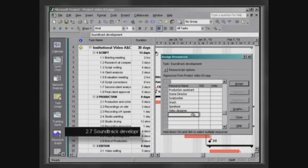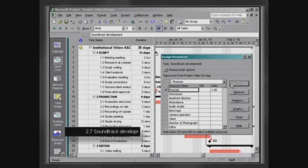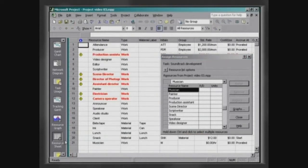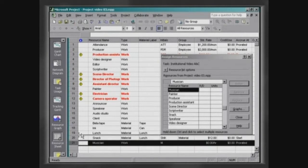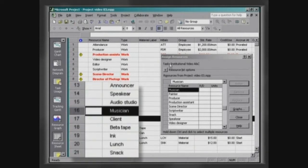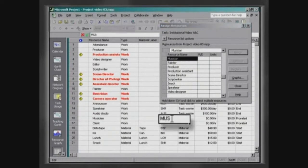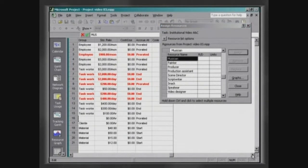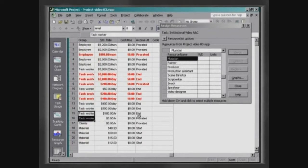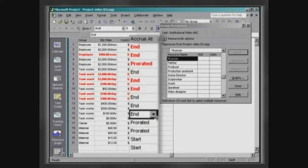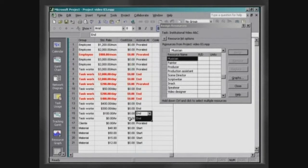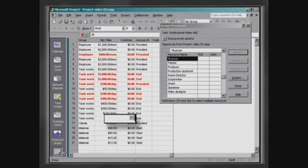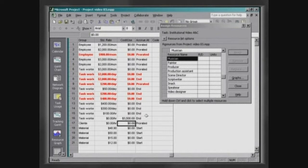The insertion of a new resource can also be made through the box assign resources. If you check the resource sheet at this point, you can visualize the resource musician. To organize this spreadsheet, move this resource down to the resource audio studio. When filling in the fields of the column group and accrual, you can use the auto fill-in tool. Just click on the lower right corner of the cell above and pull it down. Use the field cost per use to attribute a cost to this resource. The musician will charge a fixed amount to play the soundtrack, irrespective of the duration of this task.